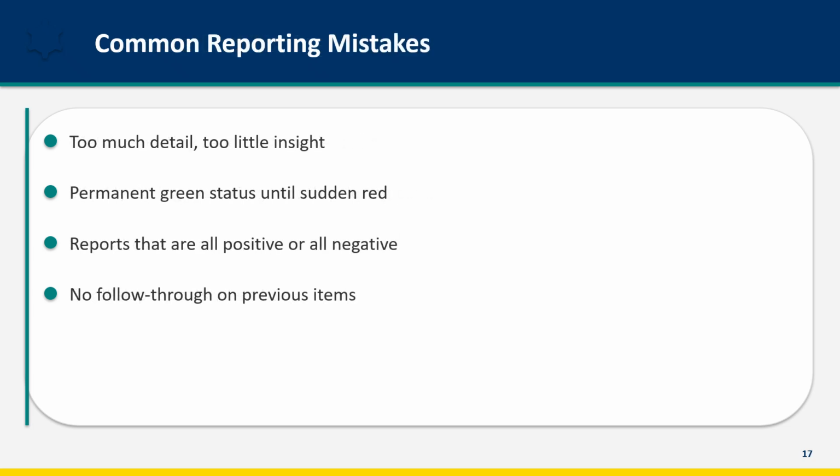Watch out for common mistakes. Too much detail with too little insight buries the important in the routine. Permanent green status until a sudden red destroys credibility. If everything was fine last week, why is it a crisis this week? Reports that are all positive or all negative seem unrealistic. Most projects have both wins and challenges.